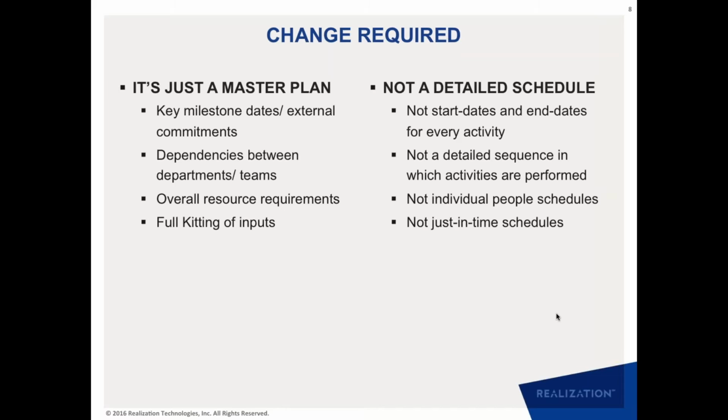What I mean by that is that a project plan is good for key milestone dates or external commitments, but it is not good for start and end dates for every activity inside the project. Similarly, the project plan is good for managing dependencies between departments and teams, but it is not a detailed sequence in which activities should be performed. Similarly, it is good for overall resource requirements in terms of how many people or what skill I need in which week, but it is not good for managing people's detailed schedules.